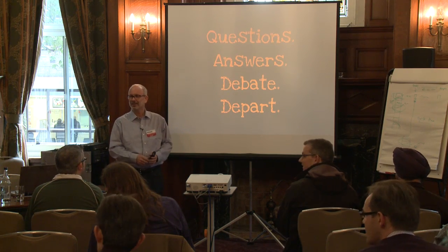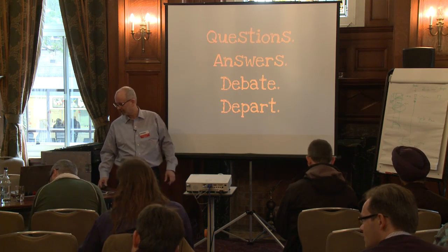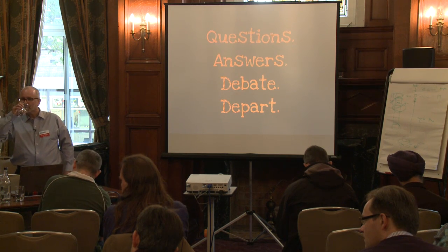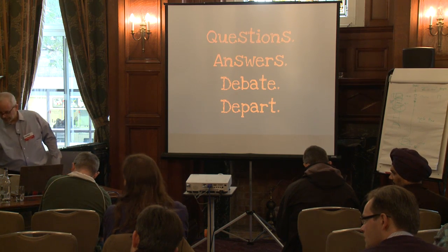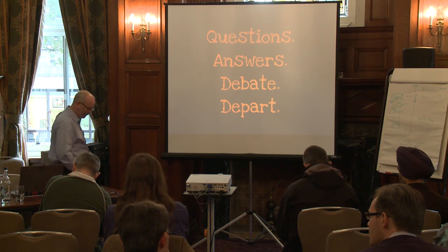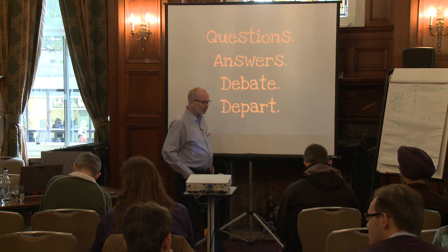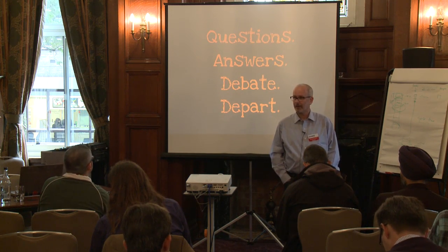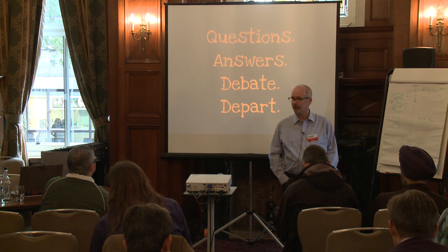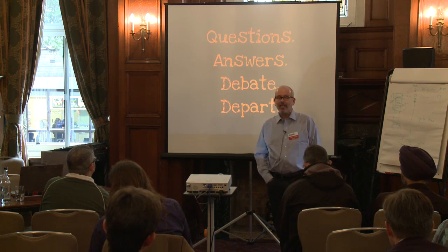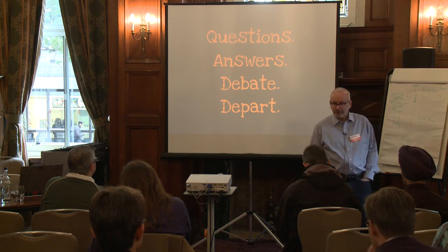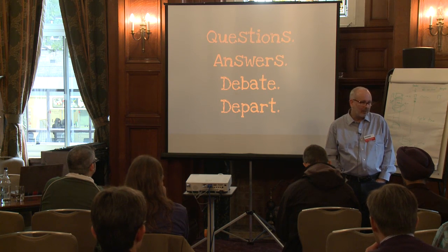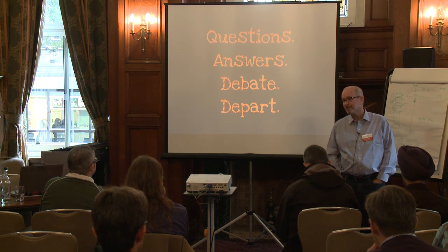But I just wanted to clarify your last statement. When the platform guys are working on the squad tasks, are they actually part of the product scrum at that point? Yes, what we're doing right now is we typically have our scrums in the mornings. Okay, so the platform guys are there. They're working all day on the teams that they're embedding with. Okay, they have what I call a huddle in the afternoon. So kind of like before they go home, they'll come back and talk about events during the day.